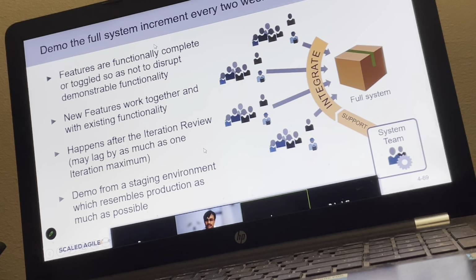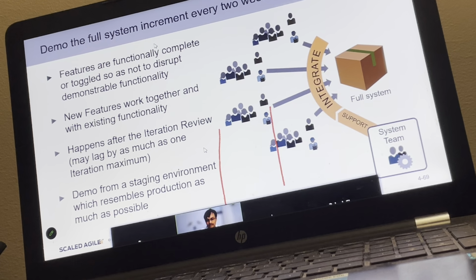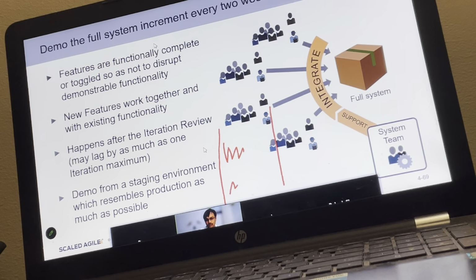Now, the recommendation is that we better get the system integration done on a regular basis and improve the definition of done of the team, so that these things get identified as early as possible. Going forward, our idea should be that system integration should not wait for the iteration to finish. It should be done more and more early, but whatever is right now, we need to figure out how we handle it.